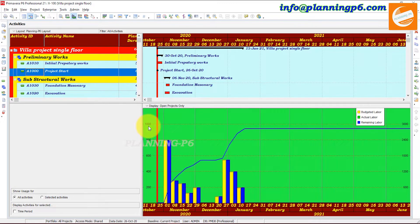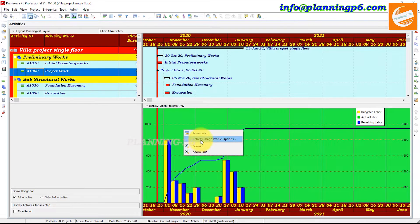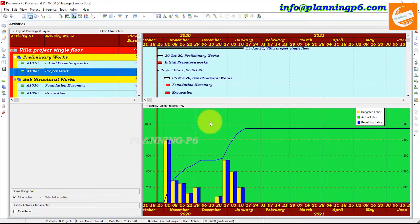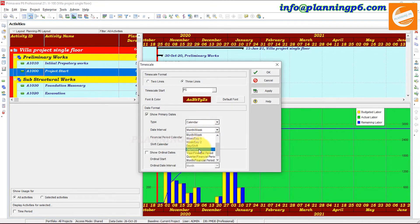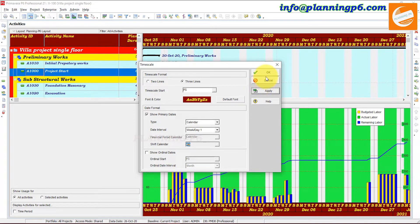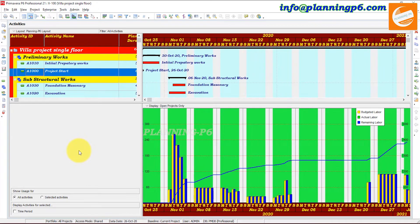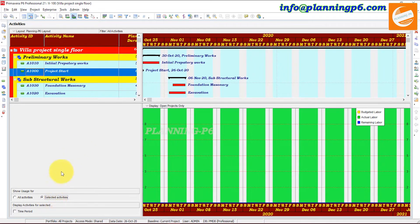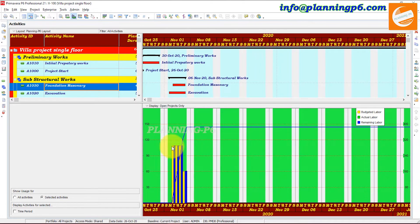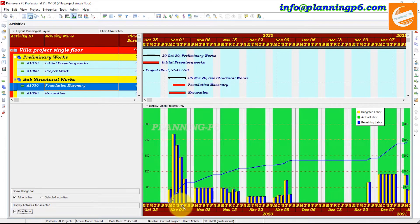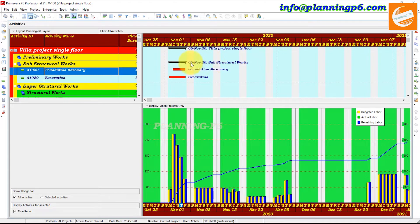It is for the months. If we go to the timescale and select per day — week day one — apply and okay. The maximum units for some activities are shown, and the cumulative is also there. These are budgeted individual values and these are cumulative. We have the option to see by activity — select for the selected activity — and you can see individual activities as well. Here you also have the option to see by time period.